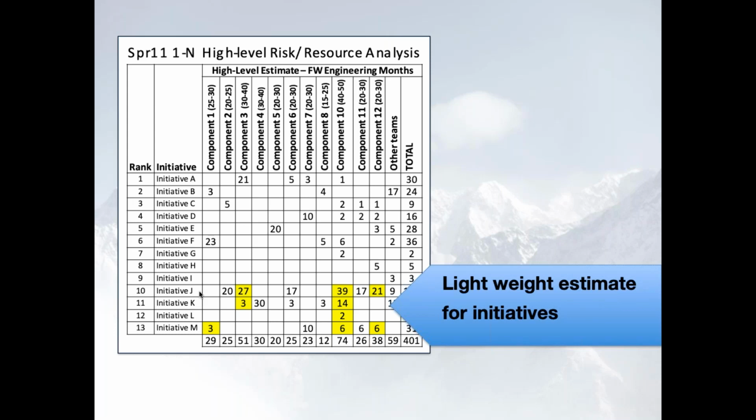And they were engineers that worked in the code, knew how the different pieces worked, and they could give a high level estimate of what it would take. It wasn't perfect, it wasn't accurate. We didn't measure these teams on accuracy to plan. But then when we went to do the work, we'd have a feature kickoff meeting where the system engineer would come in with the marketing person and the team that was going to do the development. You'd review the design, you'd review